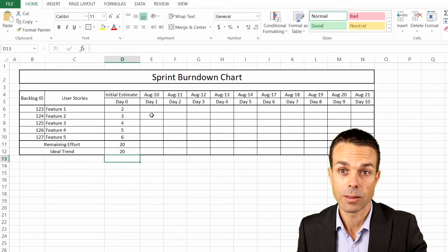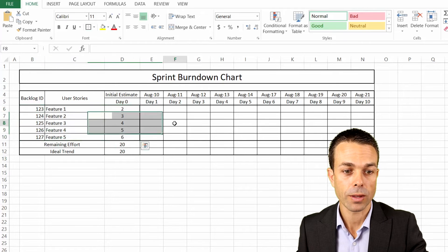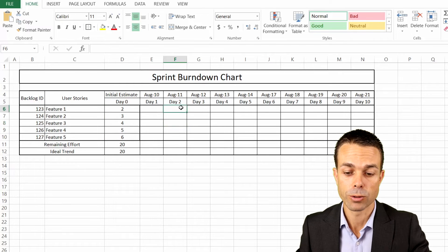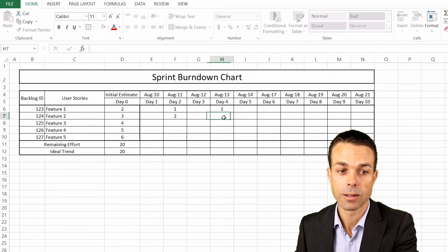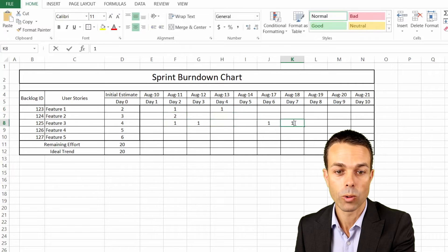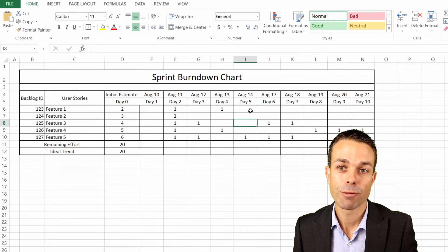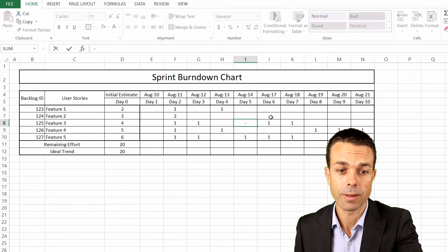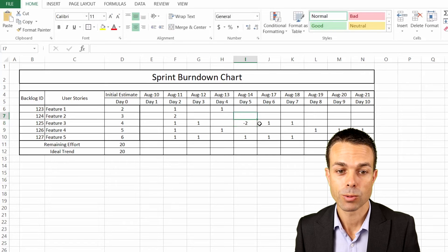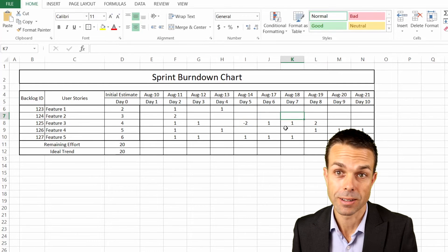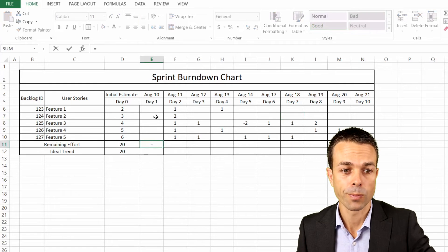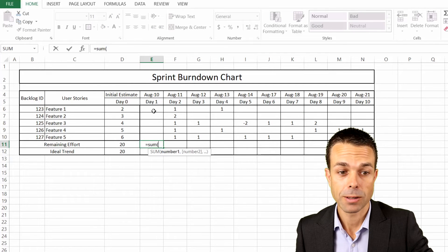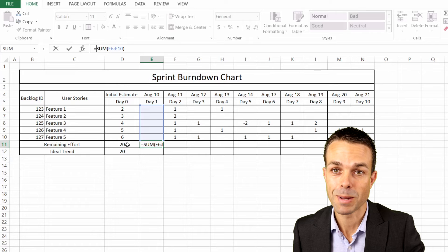For our remaining effort, first we'll have to put in the detail of what will actually happen over our sprint. Let's say for our first feature, we do one day's worth of effort here, and one day's worth of effort there. For feature two, we do two days here, one day there. For feature three, we do one, one, one, and one. Now if we want to add effort during the iteration, we can just do a minus. Let's say we've added two days worth of effort, so there's an extra something that comes up for feature three. We want to do the total of all of these columns. We start with the remaining effort cell, and then we minus the sum of all of our effort for that particular day.